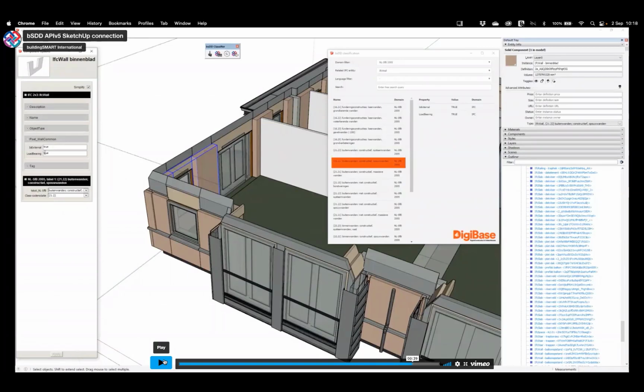But that gives me the opportunity to talk about another use case, because you also made a business case on this. What contractors usually do is send out a design model to their manufacturers and suppliers, and say, further engineer your parts and bring it back. So one design model is sent to a lot of manufacturers and suppliers, and then like 50 or 100 different IFC files come back with walls and windows and precast stuff, and that needs to be coordinated. So they open up Solibri again every Friday afternoon. They check it against the original design, but they also coordinate between the different manufacturing models.